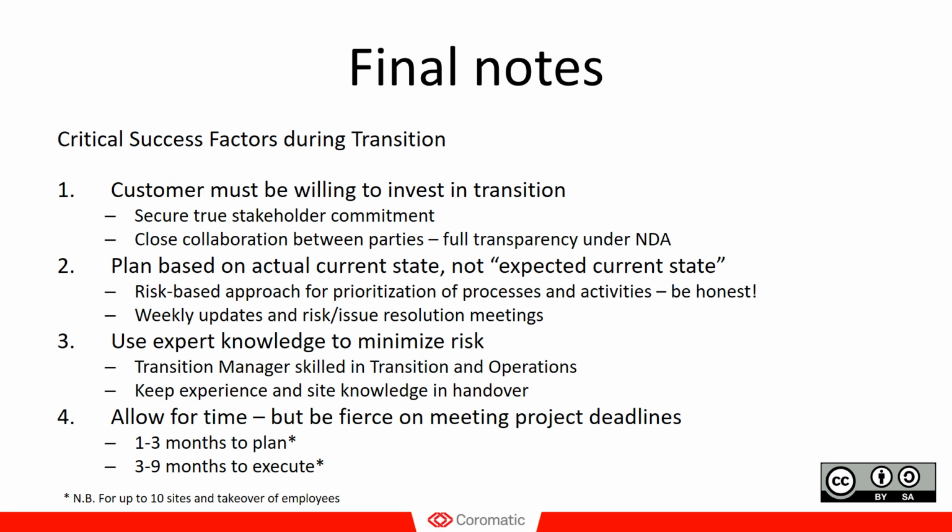So if this is a site that already is up and running in a live environment and it's going to be transitioned from one supplier to another, for example, make sure you keep the old supplier as long as possible to leverage their experience and knowledge in the area, and also include the new site operations team in the transition project so that they get to know the site and the processes and understand the ins and outs and the rationale for some strategic decisions. It will help them in their continuous work after the transition is done.